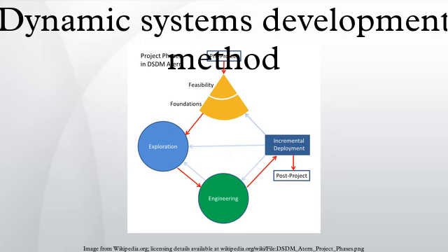Stage 2, Functional Model Iteration. The requirements that have been identified in the previous stages are converted to a functional model. This model consists of both a functioning prototype and models. Prototyping is one of the key project techniques within this stage that helps to realize good user involvement throughout the project. The developed prototype is reviewed by different user groups. In order to assure quality, testing is implemented throughout every iteration of DSDM. An important part of testing is realized in the functional model iteration.